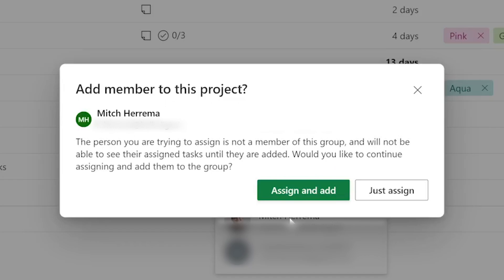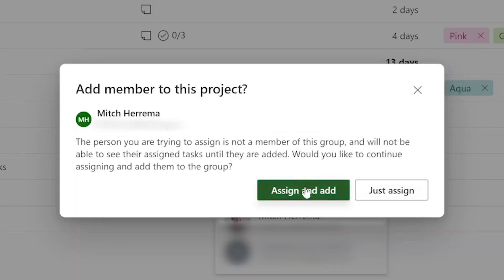When I select Mitch, Mitch isn't in my group and I get a couple options. I can choose to just assign it — what that's going to do is assign Mitch that task, but Mitch is going to have no access to actually update or see what's going on with that task. My other option is Assign and Add. If I select this option, that user is going to be automatically added to the group or team associated with this project. That's really important — you're not just giving them access to this project, you're giving them access to this group or team. That means they would have access to team chats and channels, Planner, the SharePoint site — all of the resources associated with that group or team.